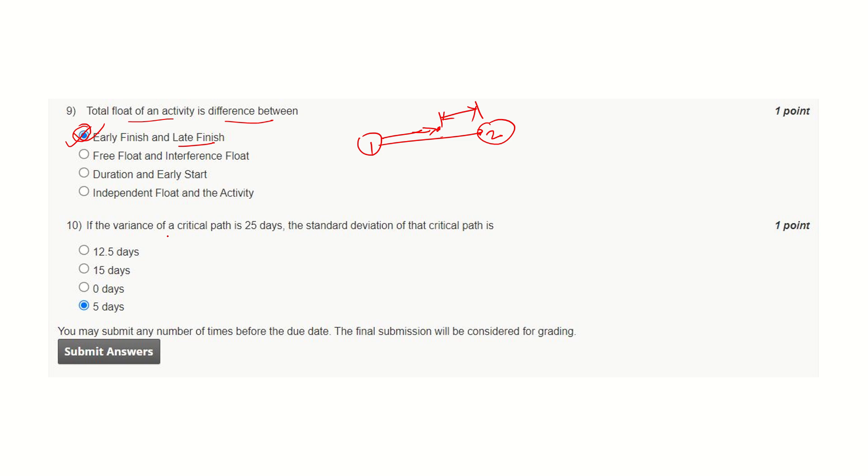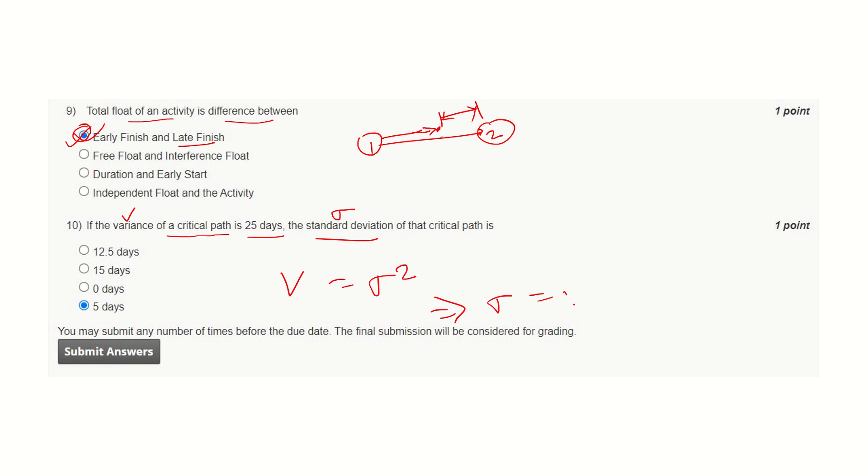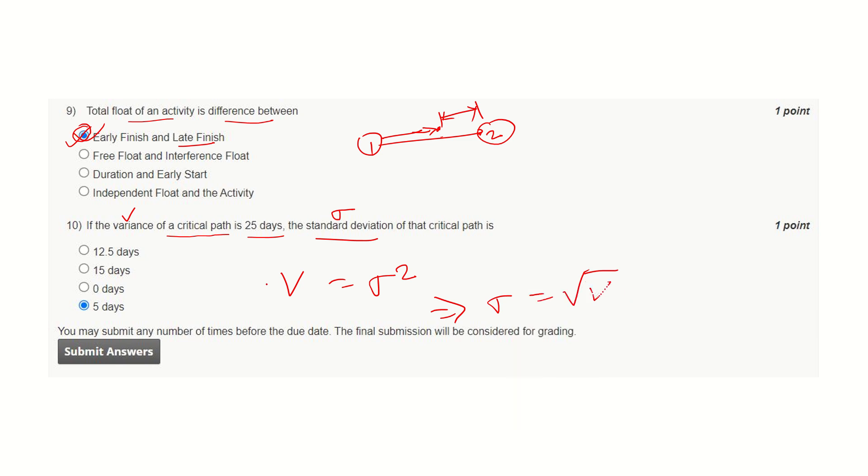If the variance of a critical path is 25 days, the standard deviation—suppose variance is denoted by V and standard deviation by sigma. The relationship between variance and sigma is sigma equals square root of variance. We have variance 25, so this brings 5, and hence this is the correct answer.